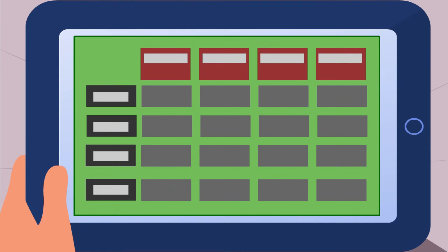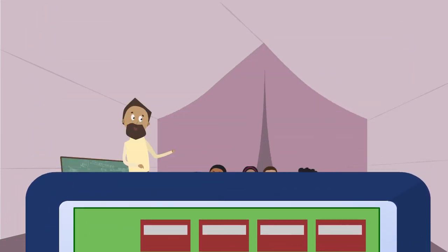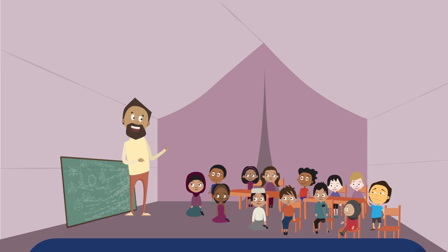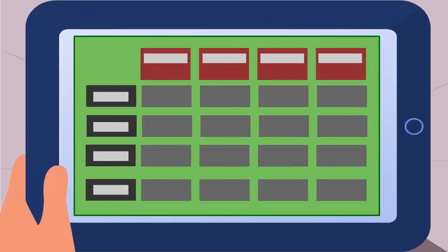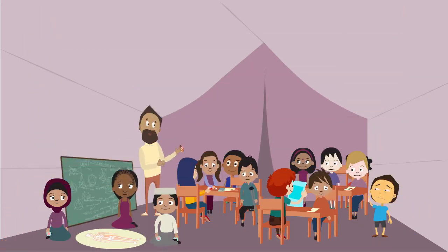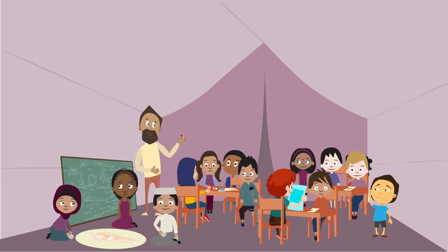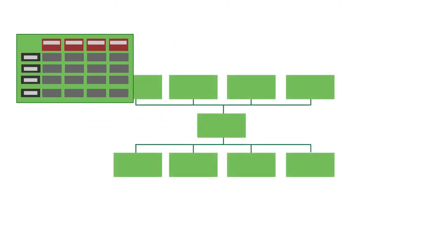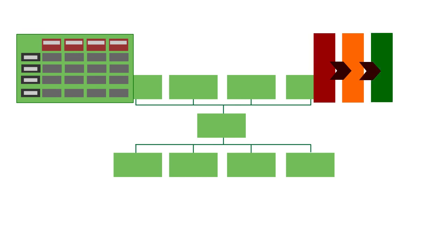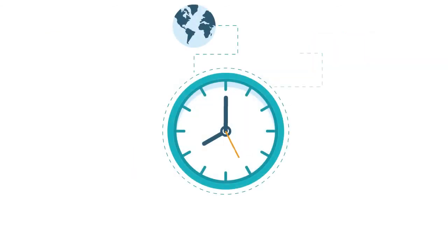Log frames are the standard project planning tool, but are too narrow for initial program design as they primarily focus on what you can control. A solution tree, developed in response to your problem tree, and a theory of change, TOC, based on a stakeholder analysis, can identify broader pathways to change that also considers opportunities to collaborate and influence.